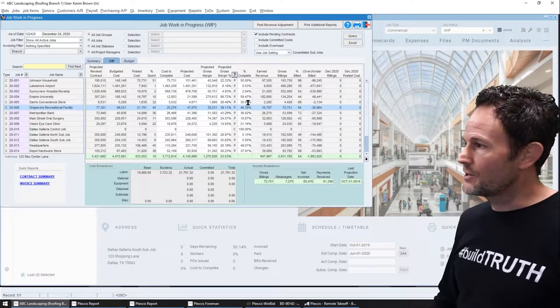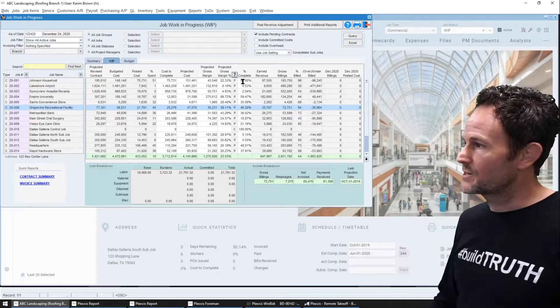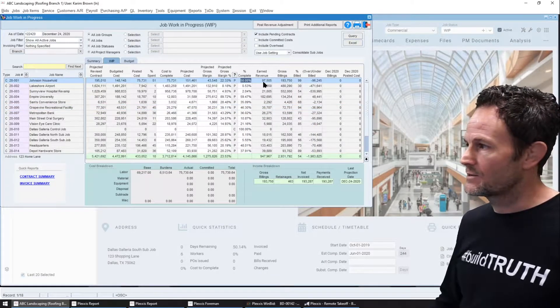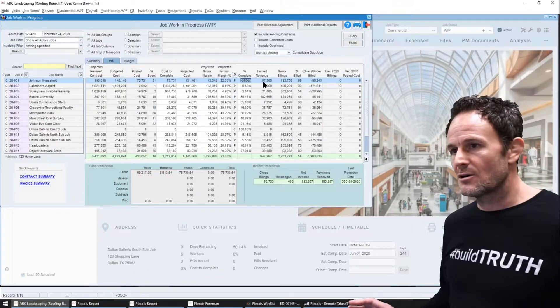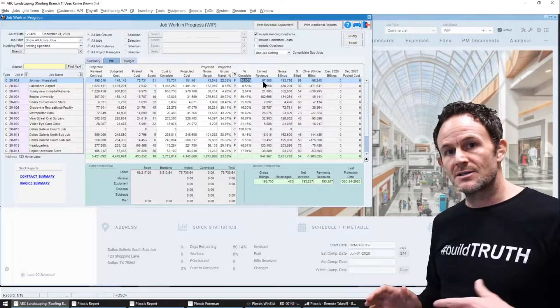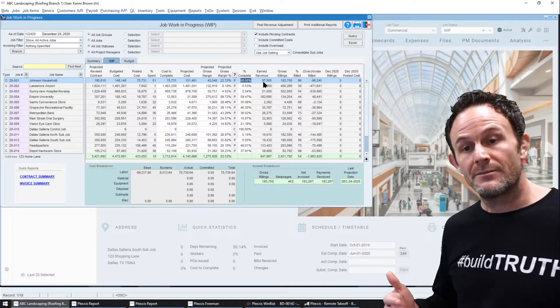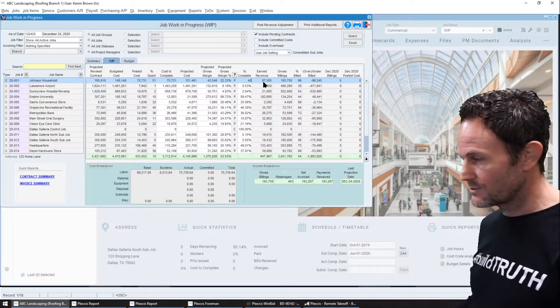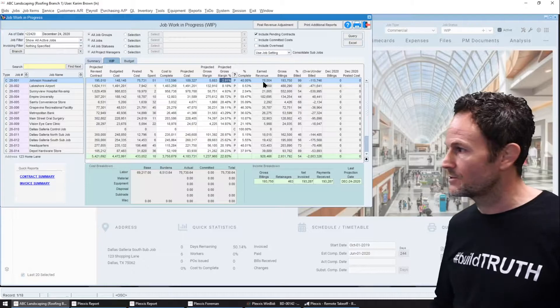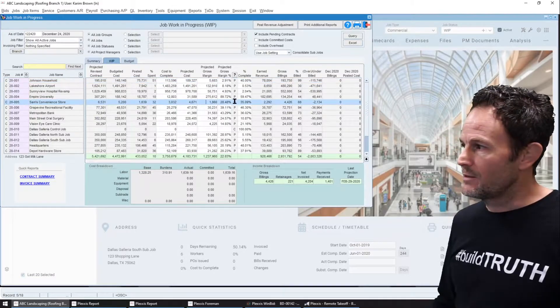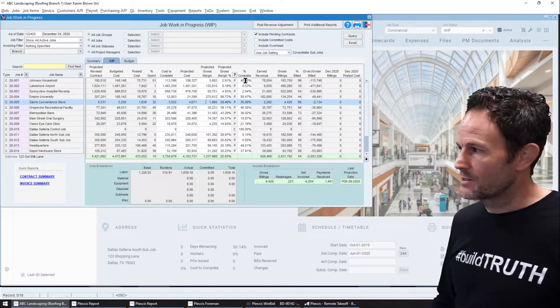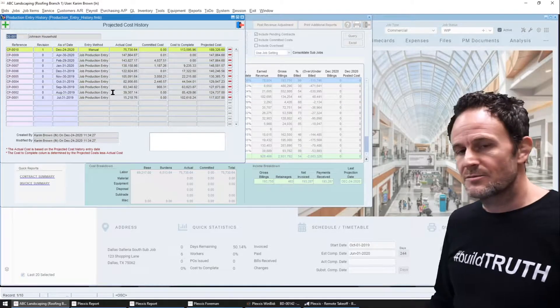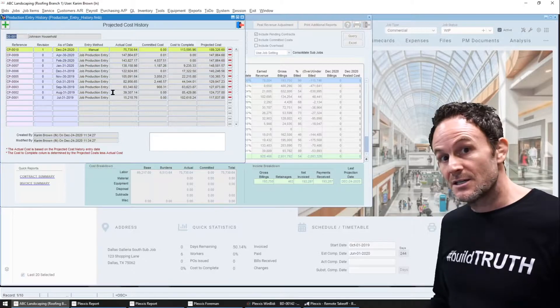Now what's cool here is let's say that the financial arm's opinion is different than what came in from the project manager and they believe that this is only 40% complete. They can make that adjustment but every single adjustment that is made is tracked.